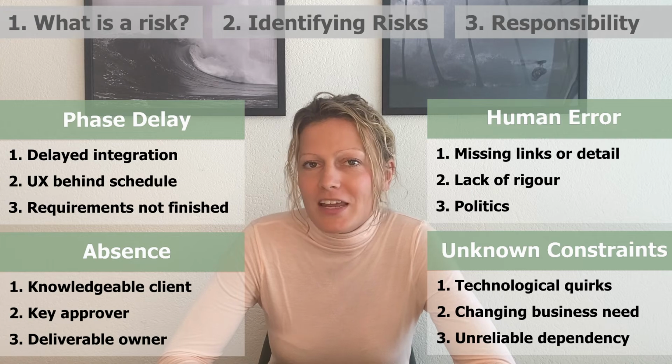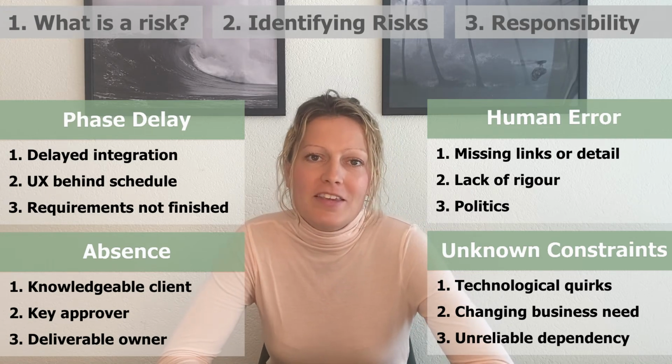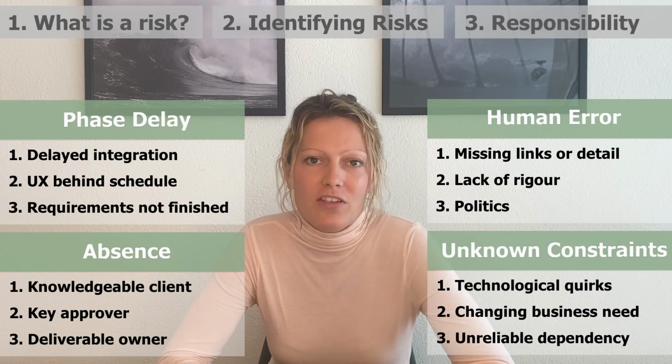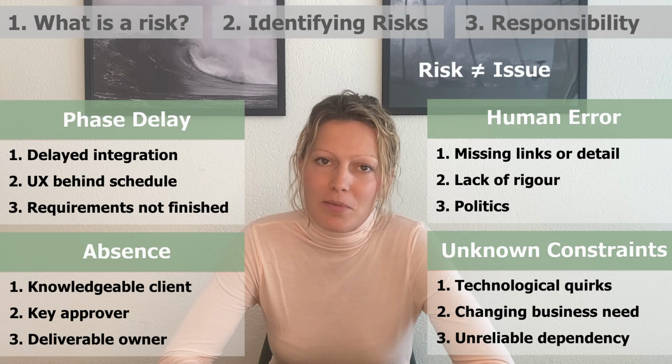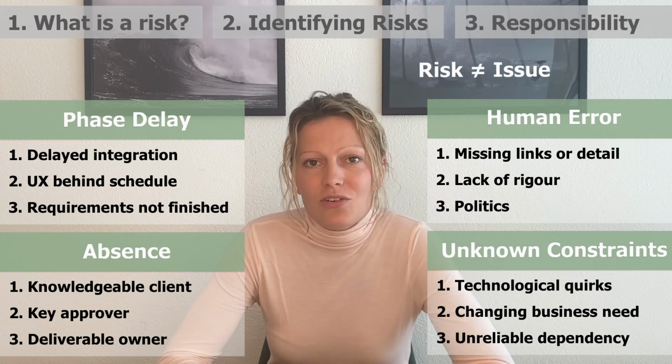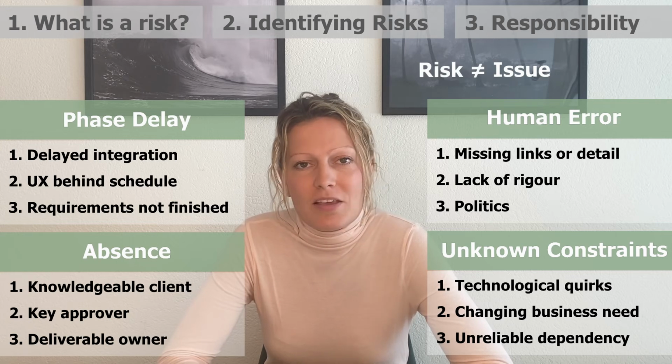When does a risk become an issue? A risk becomes an issue when it's no longer possible to mitigate and advance the impact of that risk. Remember, a risk develops into an issue if nothing is done to mitigate it. When it's an issue, the impact identified with that risk is now being felt, which usually means something negative is happening.